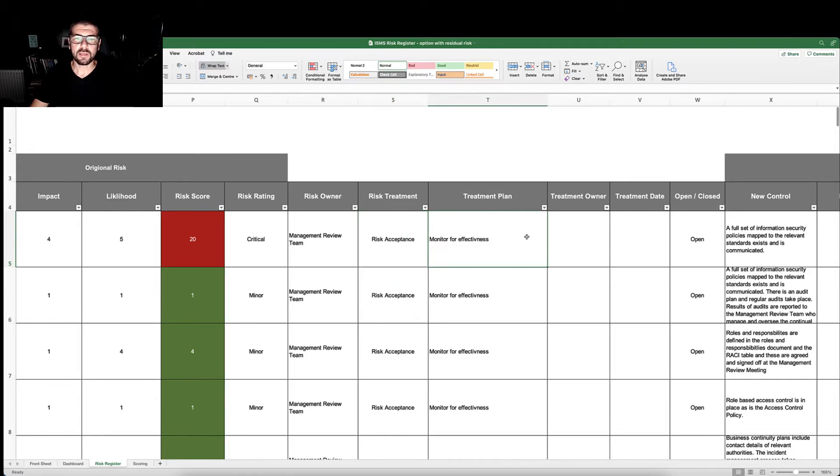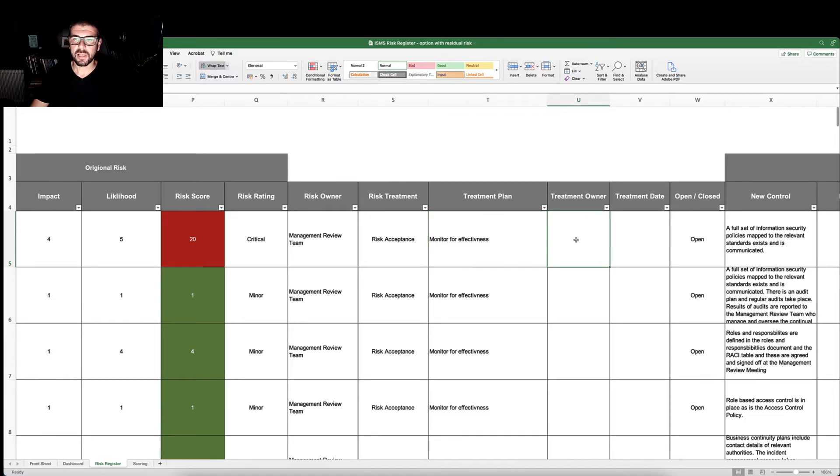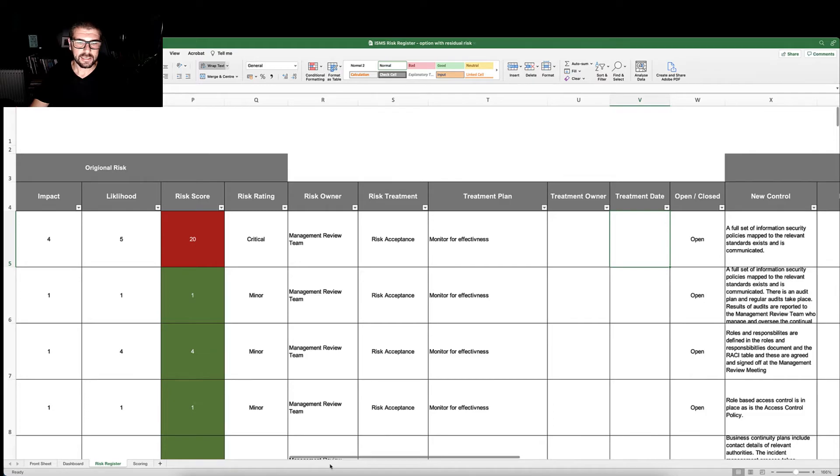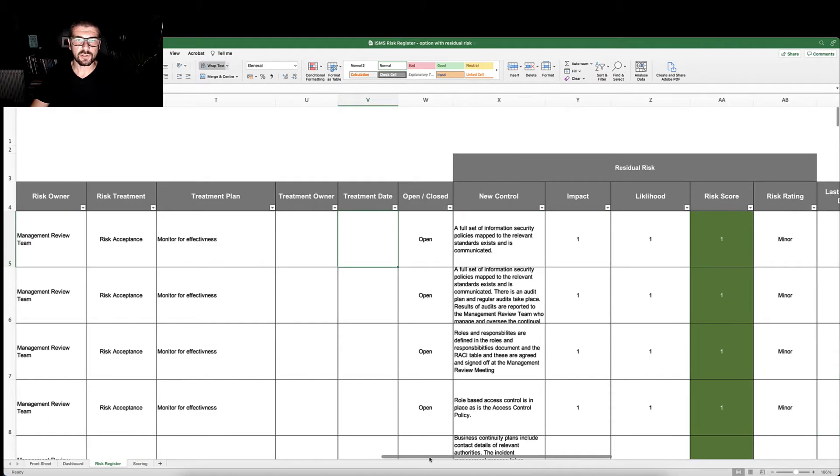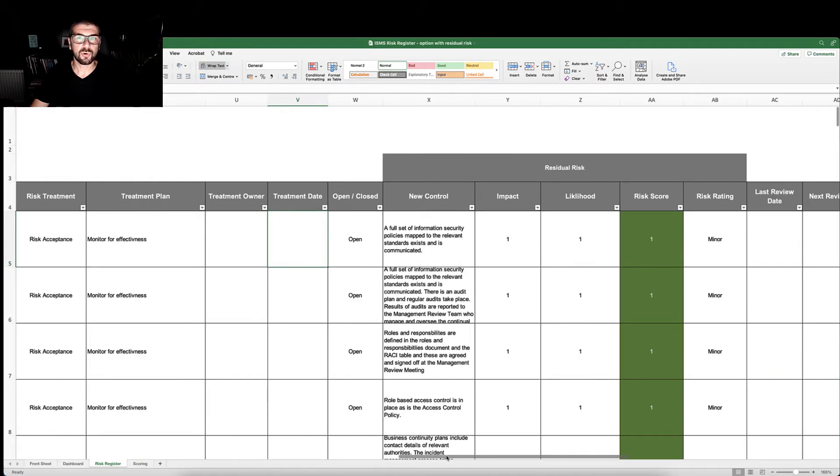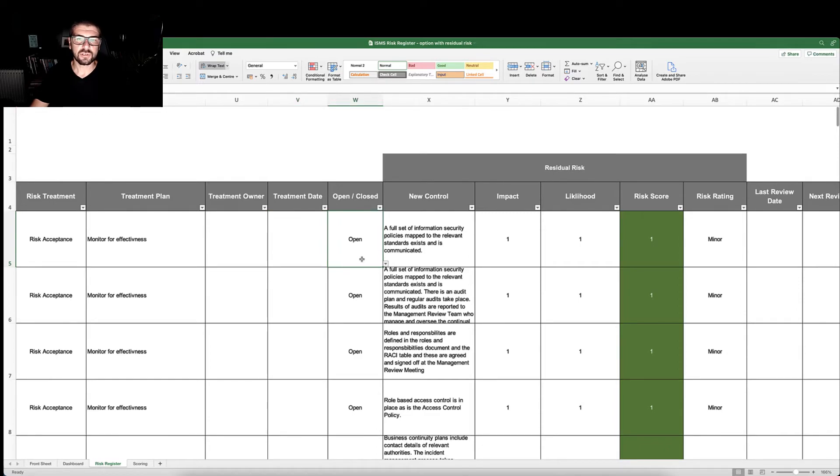We implement our treatment plan. Our treatment plan is allocated a treatment owner with a treatment date. As this is an ongoing document that we will continue to manage and report to the management review team meeting, we're going to record whether or not this risk is open or closed.